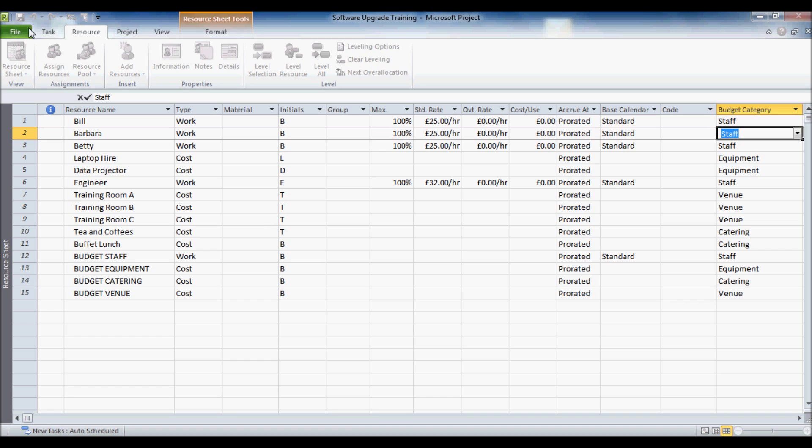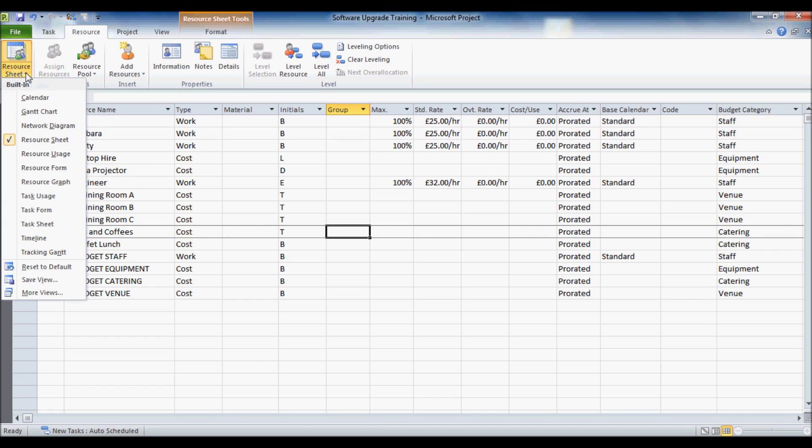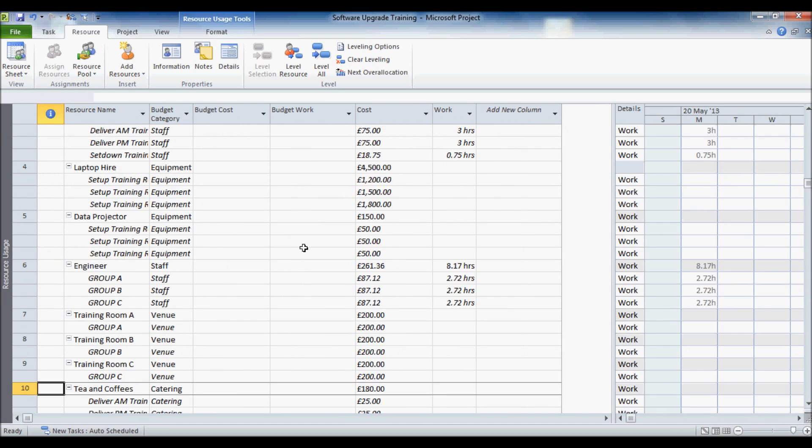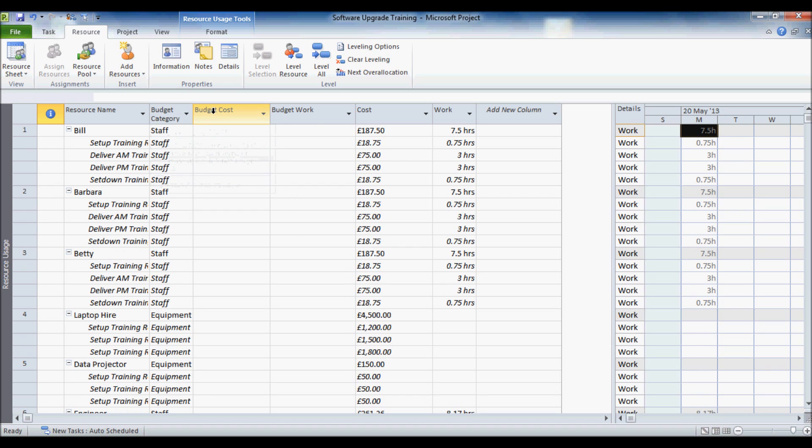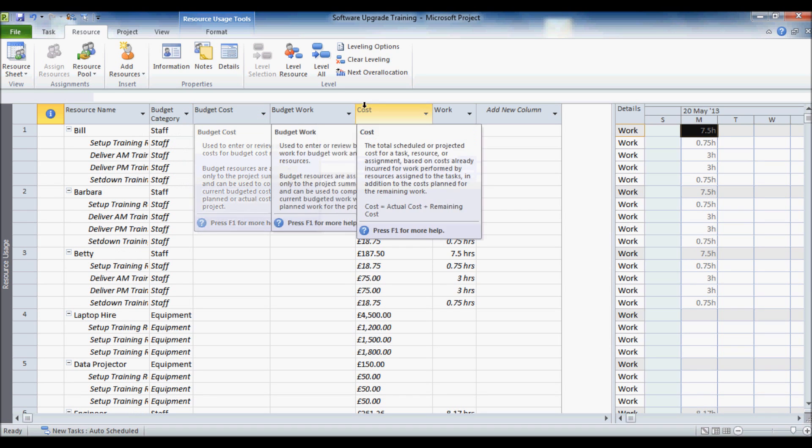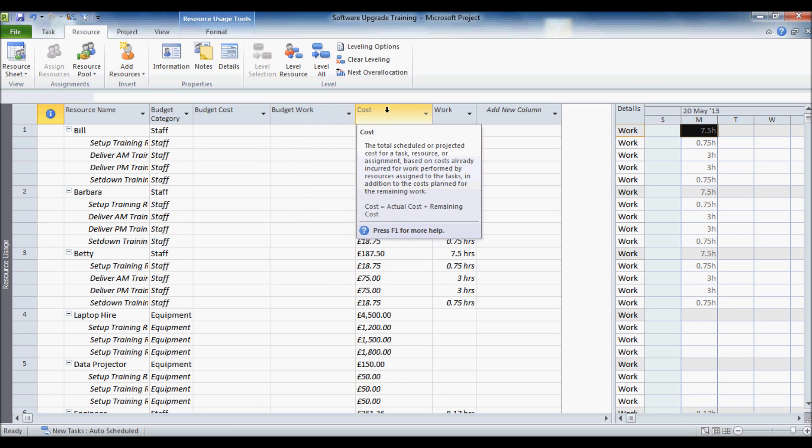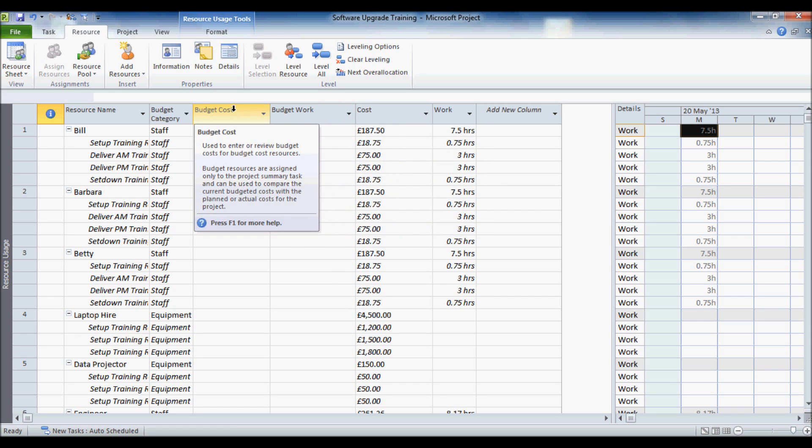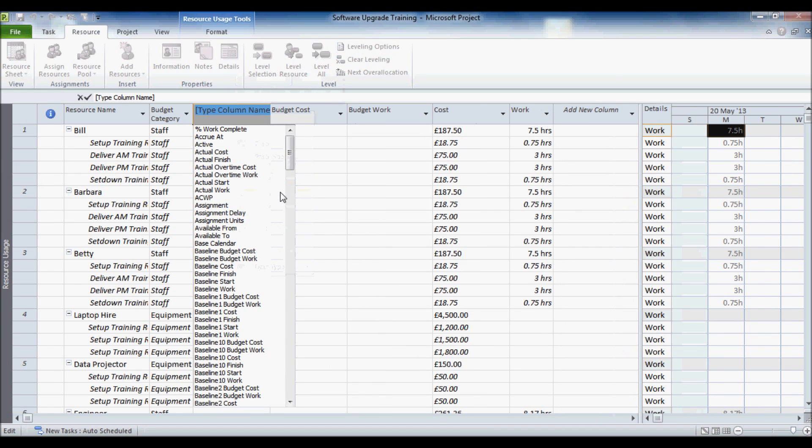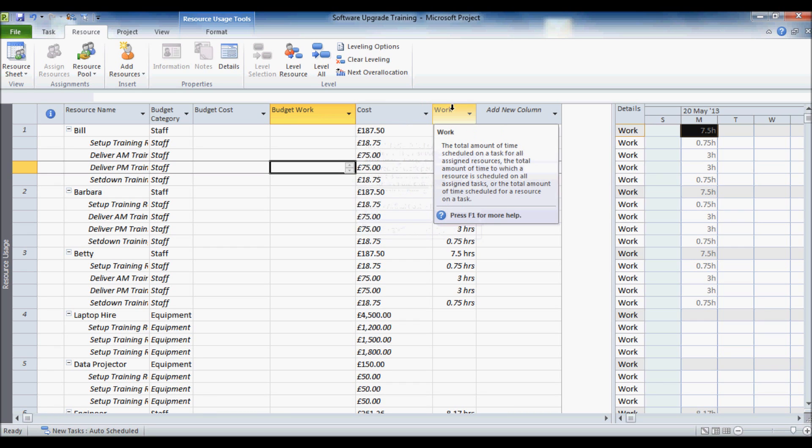Now what we are going to do next is go to our resource usage view. Now what I have done here is I have actually inserted budget cost, budget work, as well as the cost field. Now to insert any field, you just right click on an existing field, insert column and find the field that you want. But just for quickness and brevity here I have already inserted those columns. So you have got budget cost, budget work, cost and work.